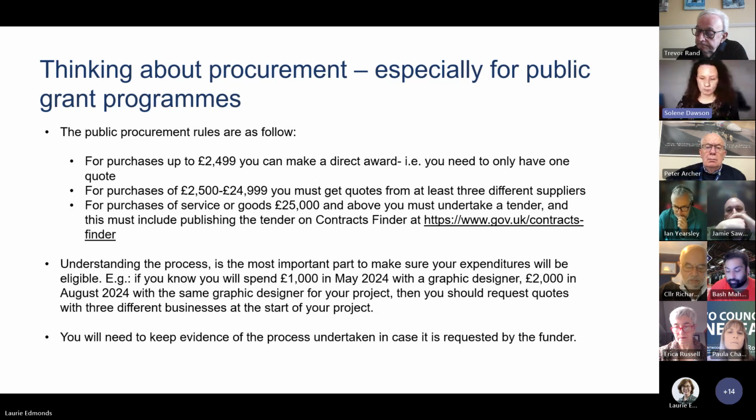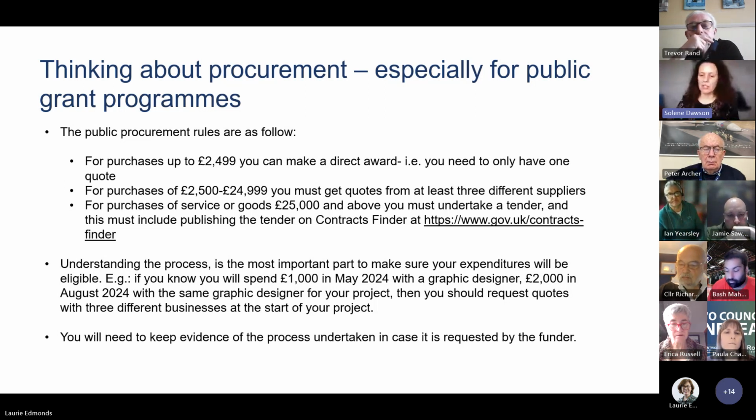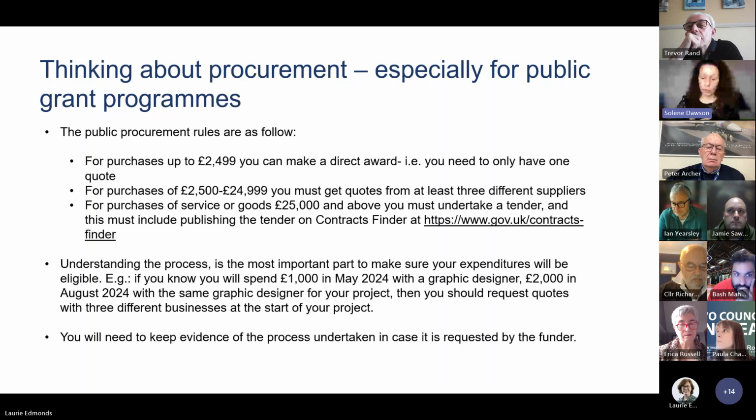I just gave you an example of a graphic designer because it's easy to split, but it will be true if you do training, it'll be true if you ask someone to do workshops, or a venue you're going to use for the whole part of your project. It's not about the cost of hiring the venue for once. It's over the course of your project. Are you going to spend more than £2,500? And as I said before, you will need to keep evidence of the process undertaken, just in case the funder requests to see the evidence.